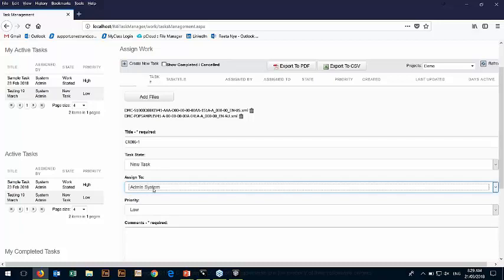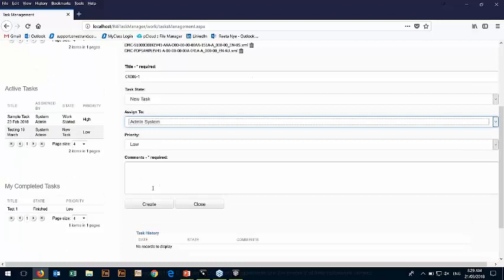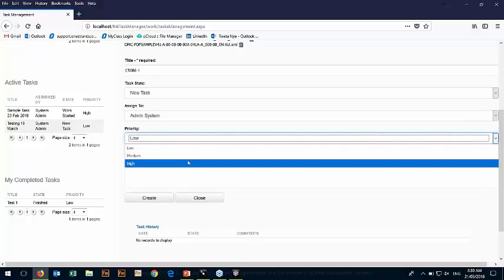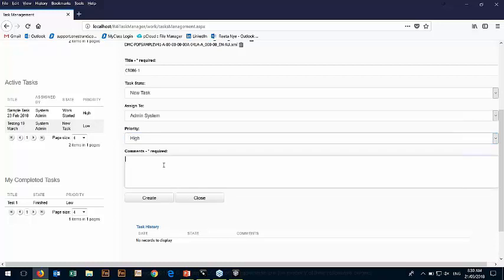And then we've got our priorities. So this is where we can indicate the urgency of this work. With this, we're now looking at either low, medium or high. So you as an organisation would determine the definitions for those priorities. You would make that decision, and then as an organisation, you would then action it. So if it was decided that high is super, super urgent, you've got no choice, done, irrespective of what you're doing at this point in time, that's the one you need to work on. But that's a business process. It's a business process. So you choose which one it is, and then you put in the comments.